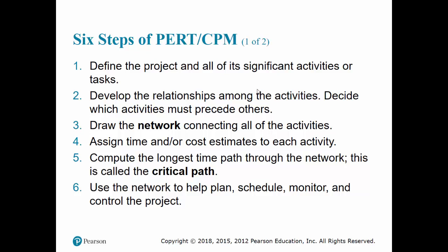And then once we have that, and the time and the cost associated, we can develop paths along the network. The longest path through the network will represent the critical path. That's the one that's going to determine when the project will ultimately be completed. So we use this network to come up with schedules, the early schedules and late schedules, and we use that to monitor the project in terms of time schedule and budget.